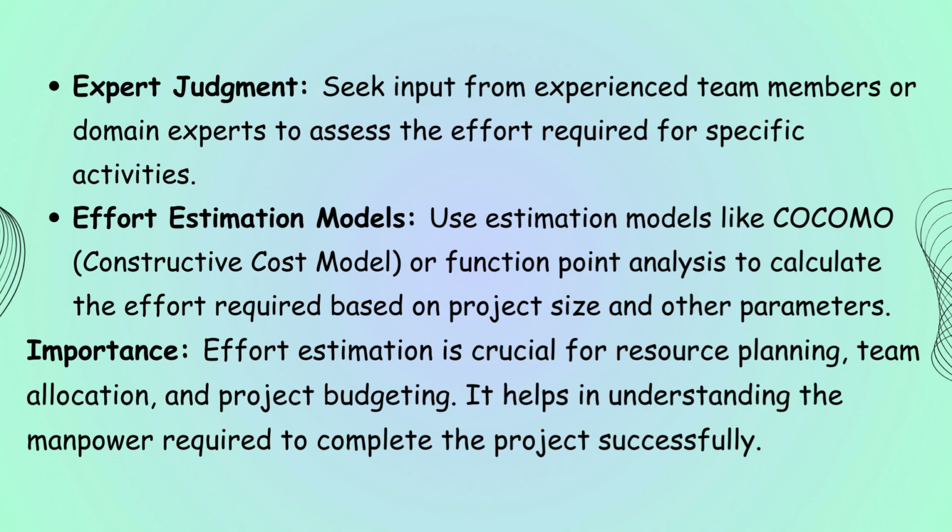Effort estimation models: use estimation models like COCOMO, constructive cost model, or function point analysis to calculate the effort required based on project size and other parameters. Importance: effort estimation is crucial for resource planning, team allocation, and project budgeting. It helps in understanding the manpower required to complete the project successfully.